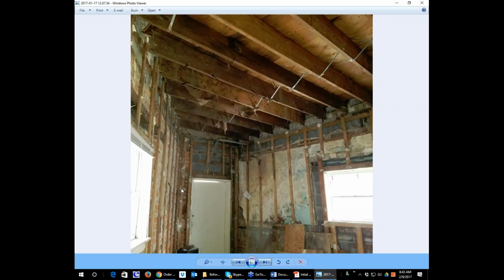So now this is that corner piece that I was just showing you in the picture, and the client had intended to make this a little storefront, like maybe a water ice store or ice cream stand or a convenience store or something. Now, here's the situation with that, and here's the problem with that concept. In order for him to get the FHA insured mortgage, the FHA mortgage, not the 203K, but any FHA insured mortgage, the appraiser is going to evaluate the entire property.